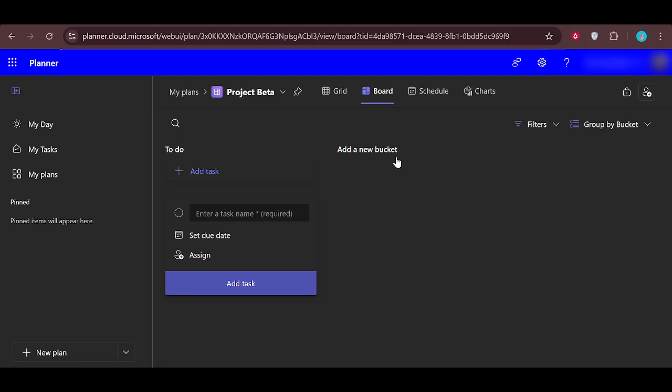If you plan to work on multiple projects, consider bookmarking project.microsoft.com in your browser so you can quickly return to your project homepage. From there, each new initiative starts the same way. Open the site or access it from the app launcher, then click the plus button to create a new plan or project. That's all you need to get a project started in Microsoft Project on the web.